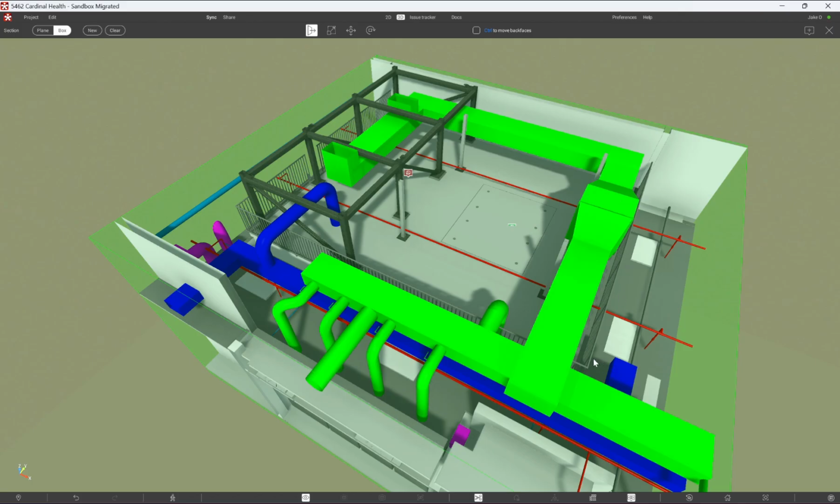And we also did have to look out for this railing. So we needed a safety rail up above this vault because there will be maintenance workers up here. And so making sure that this filter box was not only avoiding this fence line, but also staying out of the drop zone was important for us. And having this model was really what allowed us to discover that and even create a possible solution.